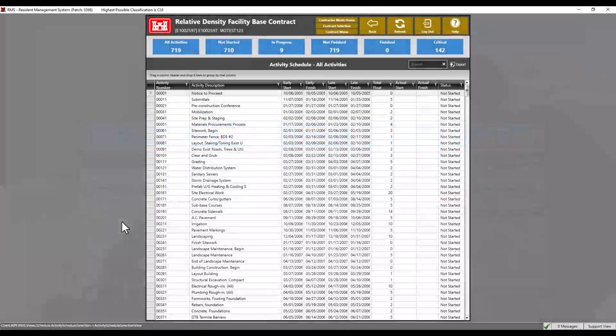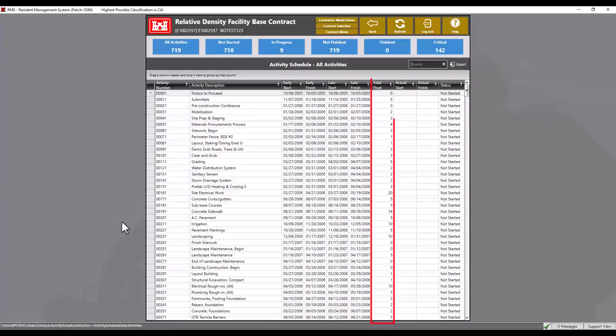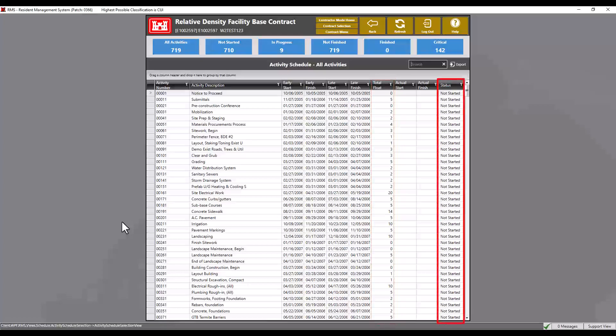Dates in the data grid are read-only. The total float column is the difference between the early start and late finish dates. The status column displays the status of the activity: not started, in progress, and finished.